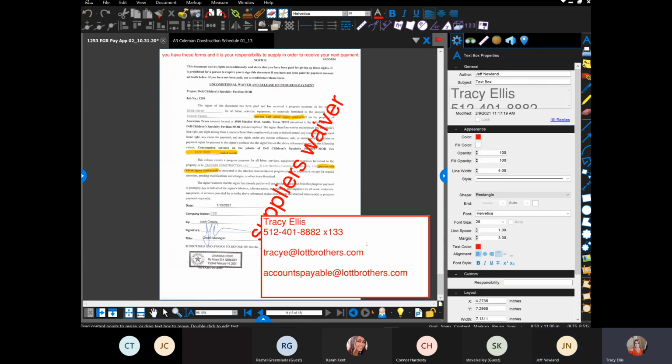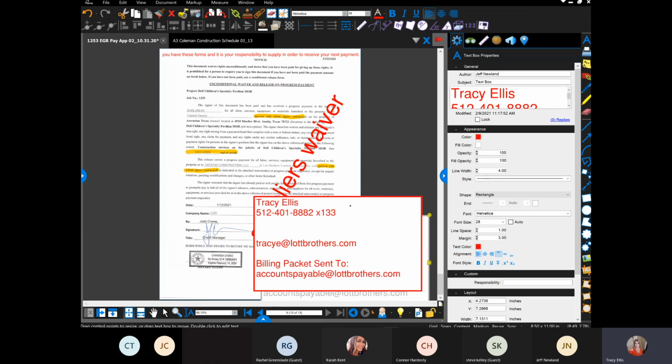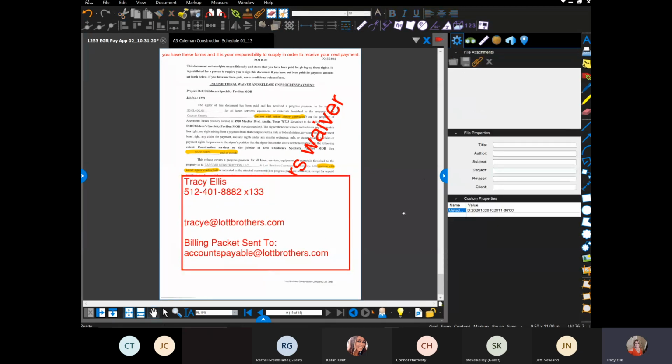The reason being is all of our staff members, all the PMs for all the jobs, can access this particular email address. And every month I go through it when billings are due and I move these emails into their job folders. So then Jeff and whomever else can go in there and pull them and start looking at them, and it helps move things along a whole lot faster for everybody. So please, please, please make a huge note that they must go to that accounts payable address, because if they go to my email or Jeff's email, we get probably 50, 60 emails a day, and it could get missed, which means your billing is going to be put off until the next month.